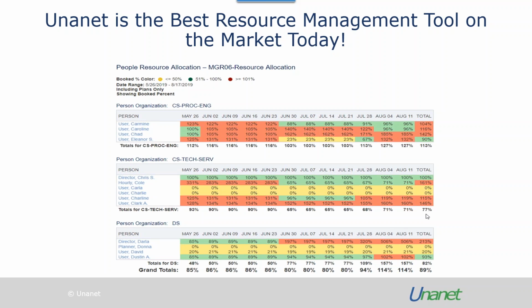One thing I wanted to bring up, because it really is a differentiator, is being able to look at resource plans through the entire project lifecycle. And so really starting from when you conceive that you might want to bid on a project and putting that in, or what I call phantom projects. And within a tool like Unanet, you're able to use things called TBD resources. So you're able to plan those, get the skill sets that you need, and then you're able then to put a factor on that. So, what is your P-win?